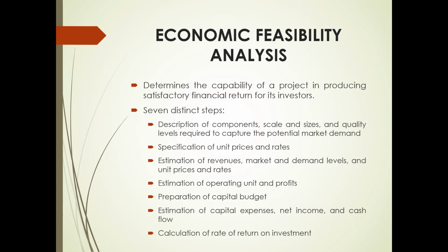The first one is the description of components, scale and sizes, and quality levels required to capture the potential market demand, followed by specification of unit prices and rates, then estimation of revenues, market and demand levels, and unit prices and rates, estimation of operating expenses and profits, preparation of capital budget, estimation of capital expenses, net income and cash flow, and calculation of rate of return on investment.